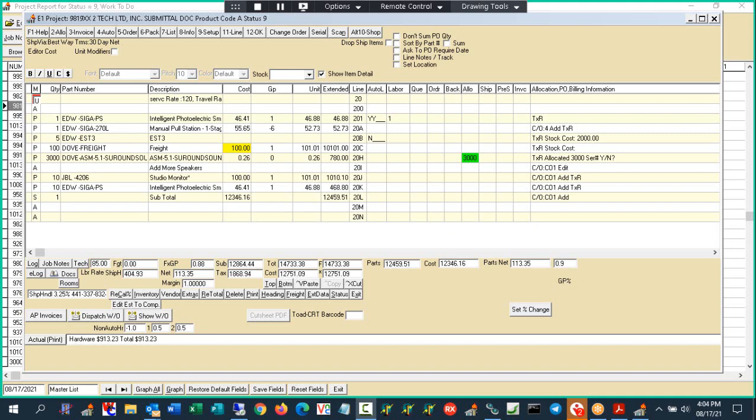Or when they're adding parts. See, the problem is when they're adding parts onto a job, they are manipulating numbers elsewhere so that the cost doesn't change. I understand. They're removing labor. So nothing remains the same from the time it's sold to the time it's done. Right. So it's not accurate.